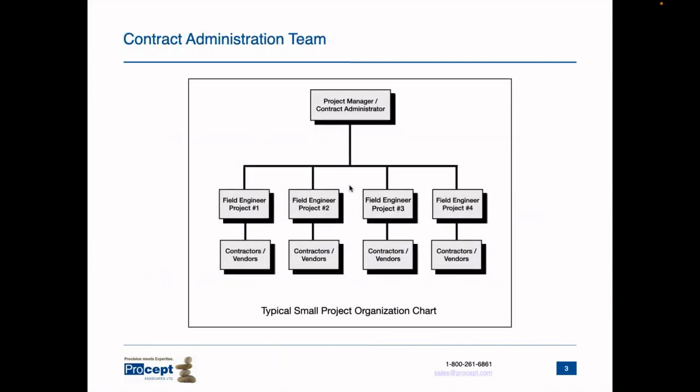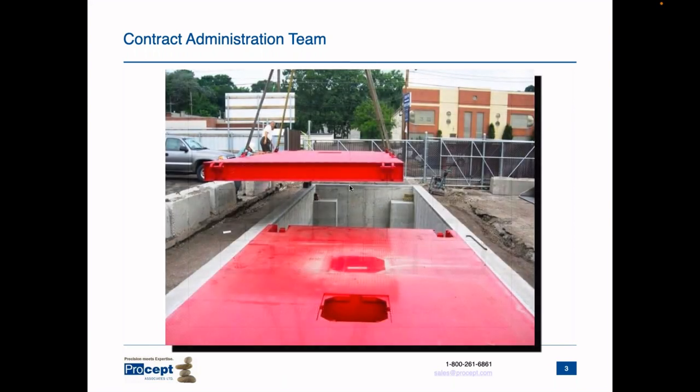To put this in perspective of what I mean by a contract administration team, here are typical organization charts from projects I have worked on. This is a small project organization — these projects were around several million dollars. I was the project manager and contract administrator, with projects in four different locations and a field engineer in each location. Examples would include a small truck scale or a clarifier.